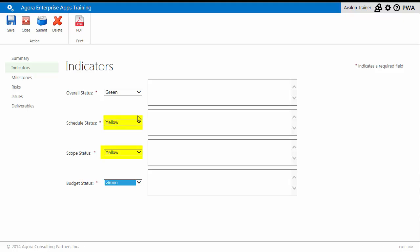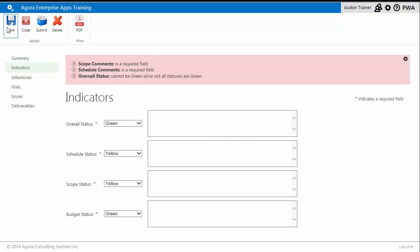Therefore, my overall status cannot be better than yellow. If I try and set the overall to green, as soon as I hit Save, a notation appears indicating the conflict.